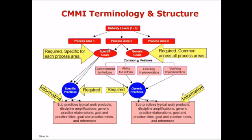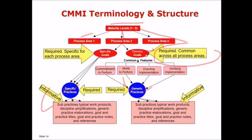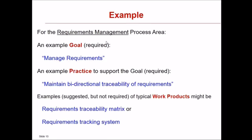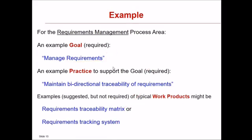The CMMI terminology and structure: at each level from one to five, there are process areas, each with specific goals and common generic goals required across all process areas, and specific practices to be followed. For example, for the requirement management process area, a goal might be to 'manage requirements,' and an example practice supporting that goal would be to 'maintain bi-directional traceability of requirements.' Typical work products might include a requirements traceability matrix or requirements tracking system.